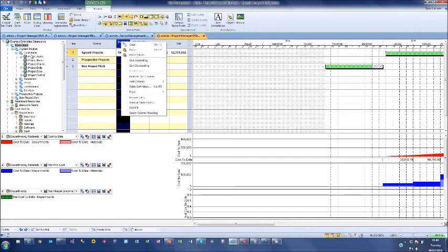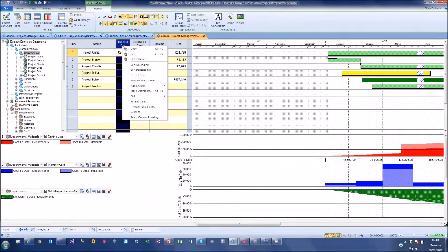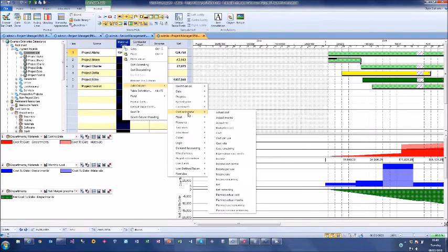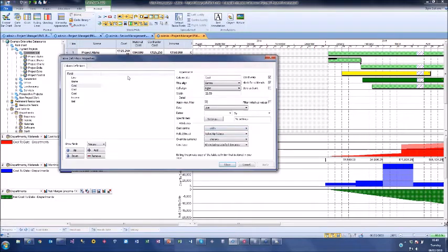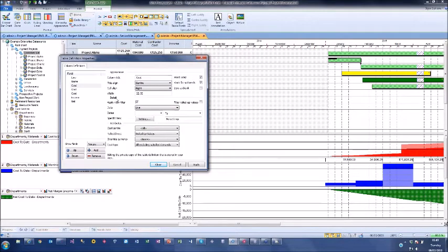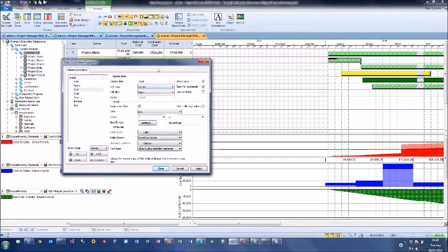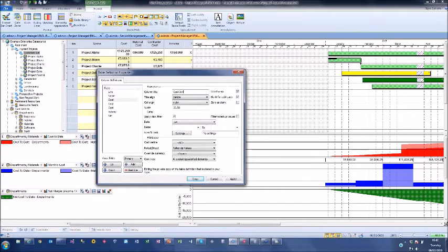Now, one of the advantages here is if I go back to this level here for a moment and just show very quickly, and this is the advantage of working with it, and you know where companies will use that, if they have costings allocated to their project, I can add in a cost column very quickly, and I can choose to say that cost column, I want to see what the cost is for a particular, let's say cost for Jan 2015, and in there I can then set my dates to the 1st of January 2015, and my completion, my finish date on that column now to the end of January, the 31st.